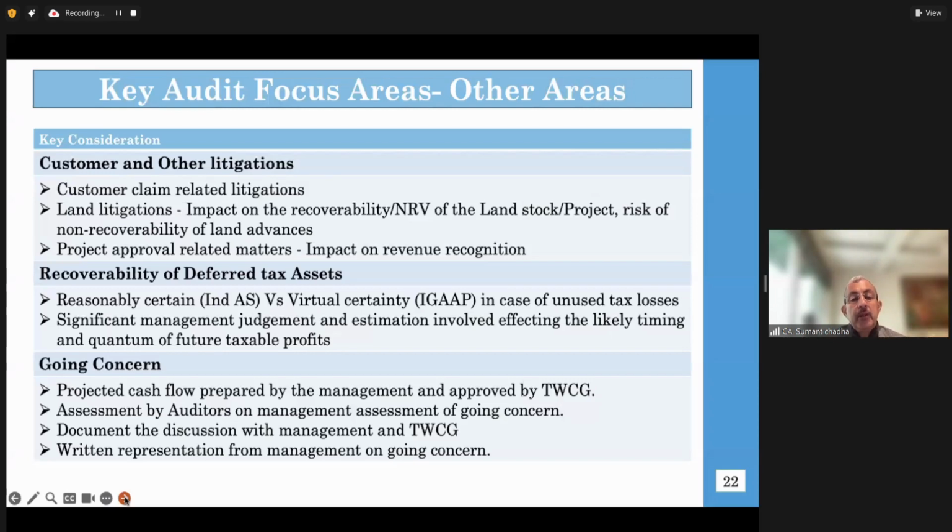There could be invariably escalations, arbitrations with the contractors. This is a norm. You get into a contract with lesser value and then you start putting claims for cost escalation, because who will decide the delays were on whose part, whether land procurement was there or whether the plans were not sanctioned, whether there was some other environmental issue like floods, or nowadays construction is banned every second day in Delhi NCR thanks to the GRAP. So, whether it's a force majeure or it is something which I have to take in stride, who knows?